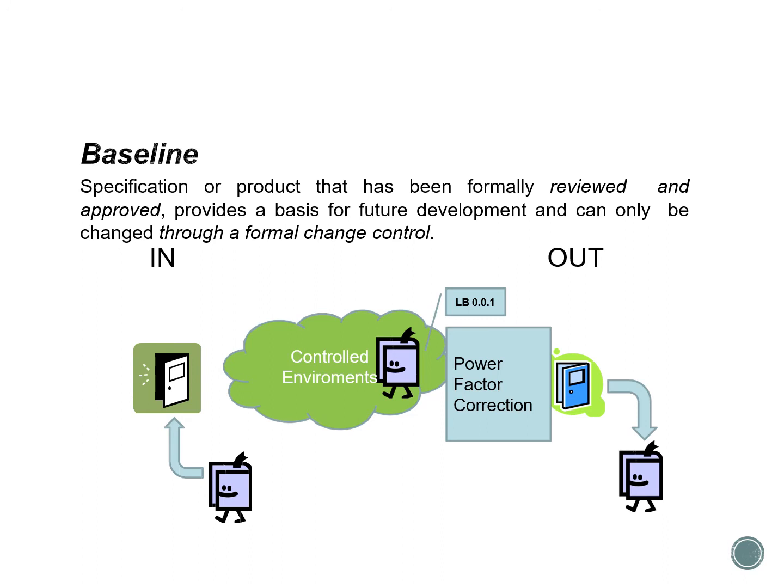It has passed our quality control, and this is the version of the software that we at this point consider to be of high enough quality. All the different things we have been talking about in the earlier lectures. If we have this sort of version, then it can be decided that this is the baseline. So we will not go further back behind this version. This is the one on which we will base all our future changes.